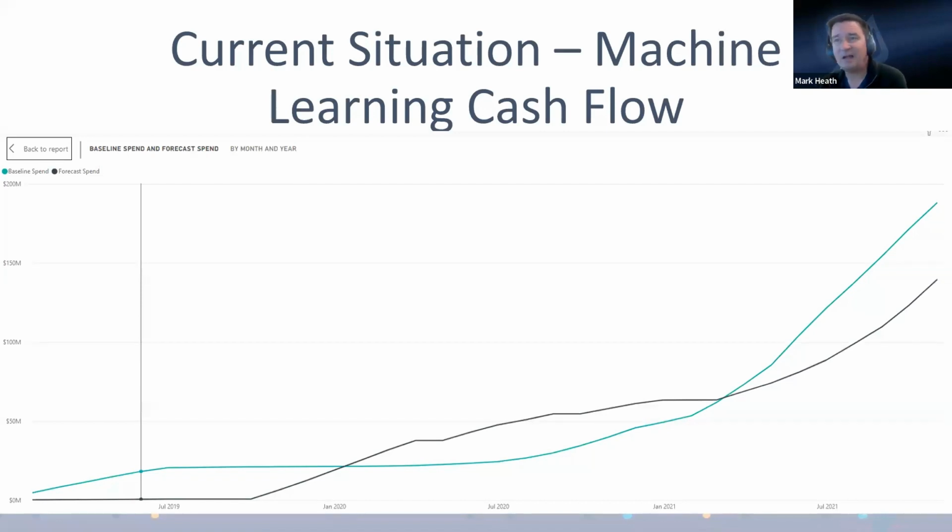It trains itself on past projects. And so if you've got similar projects in the system, the progress claiming, if you're doing contract administration, we know the progress profile of those projects because the percent complete was entered into the system. We know it by trade if the QS is tracking the trades. So there's a very rich data source there for us to train and develop new cash flow algorithms. So you then go and consult with a property developer and you say to them, this is the cash flow drawdown that you're going to need funding for an $80 million commercial tower.